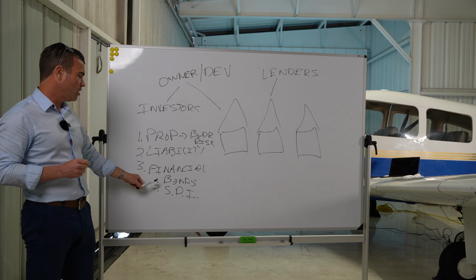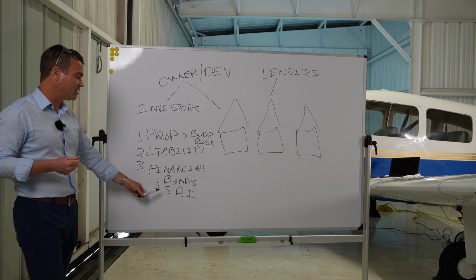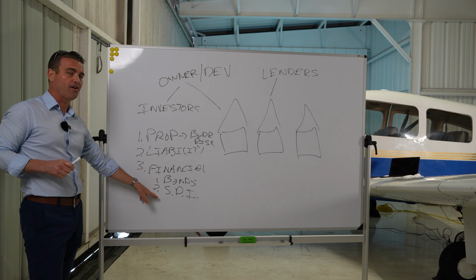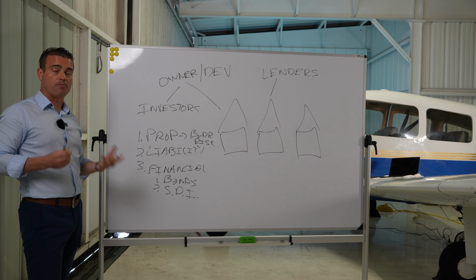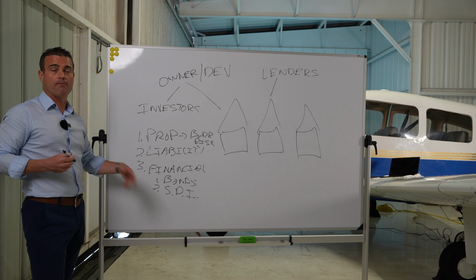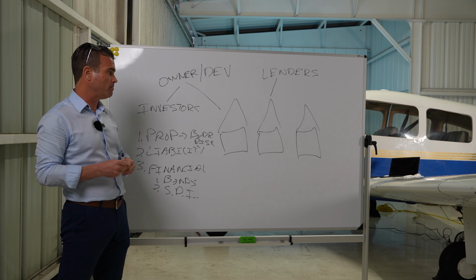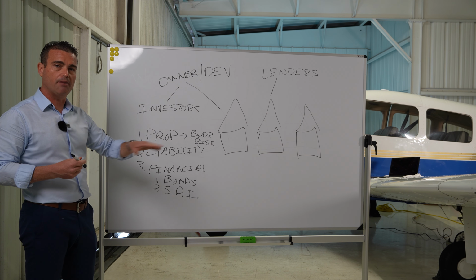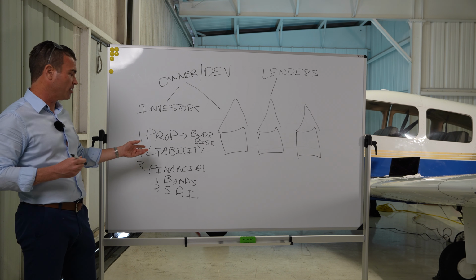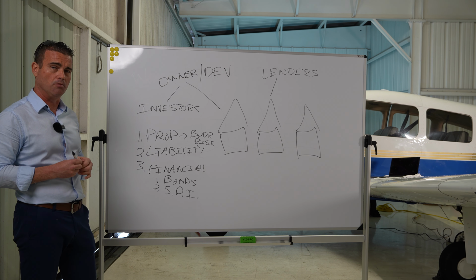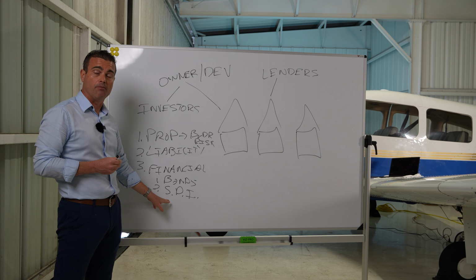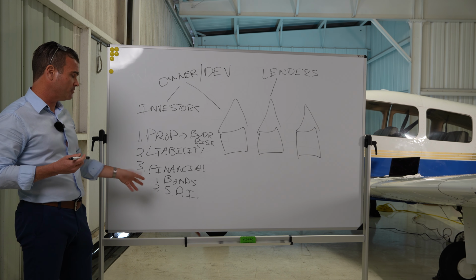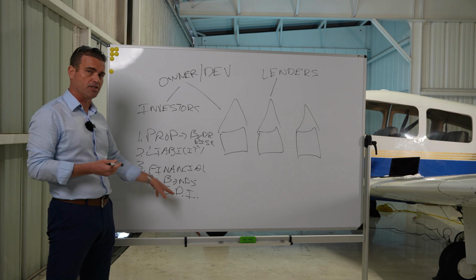One of the things that we do, of course, we review the payment and performance bonds, but on the SDI, the subcontractor default insurance, this actually is an insurance product. It's a financial insurance product, but there are certain specs in the insurance where they might only provide up to $500,000 or $1 million, depending on that subcontractor's scope. So what we do is we ask for a copy of the insurance. We want to see what limits they provide, and we also mirror that with the entire project scope, because we're already going to have the budget. Sometimes we might end up carving someone out of the SDI and require them to do their own bonding. Sometimes we might ask them to increase the SDI amount for the specific project.